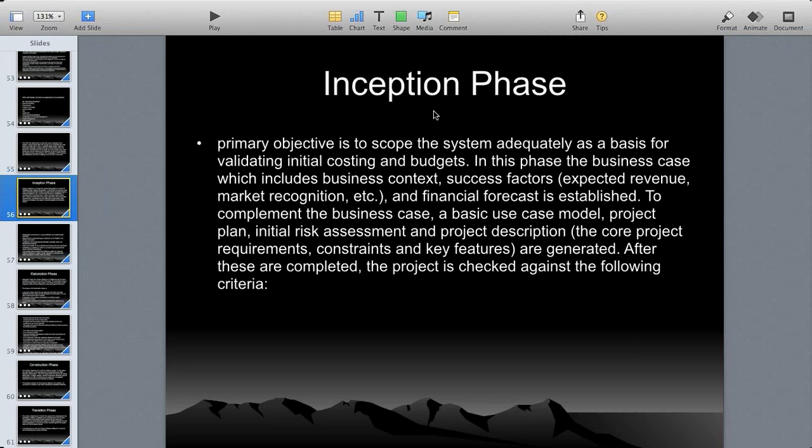By doing initial analysis. That means a civil engineer or a builder has to do initial analysis regarding the construction. This fellow should know how much the cement price is, and whether there is anything growing. Let's say a 250 rupee cement bag is going to 350, that means 100 rupees is increasing. Or the labor: let's say the government has released a new GO that labor, who were being paid 750 rupees per day, now have to be paid 1000 rupees. This knowledge this fellow should have first. Otherwise, all of a sudden the cost increases from 10 lakhs to 15 lakhs, and it is not possible for the client to pay that amount.